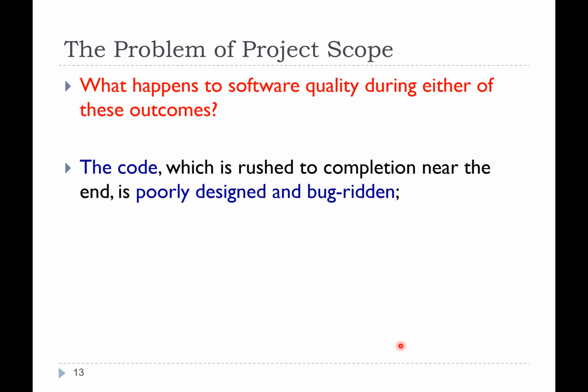Now, the complicated thing about software engineering is that it's a virtual world. So in order to understand what is going on in the software that is being created, you have to dive into somebody's mind, who's already working 24 hours a day. And to dive into that person's mind, you keep asking and asking, and you're delaying that other person, you're disturbing the other person. So it's actually been shown that if you just add people towards the end, all you're doing is slowing the project even more and more and more.